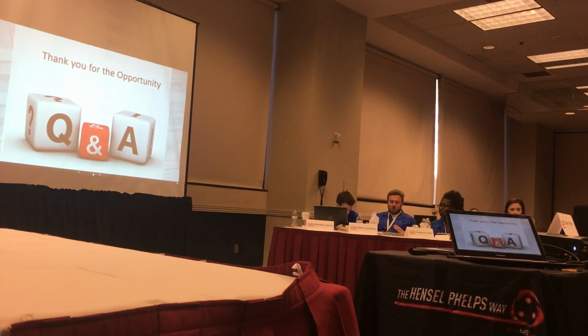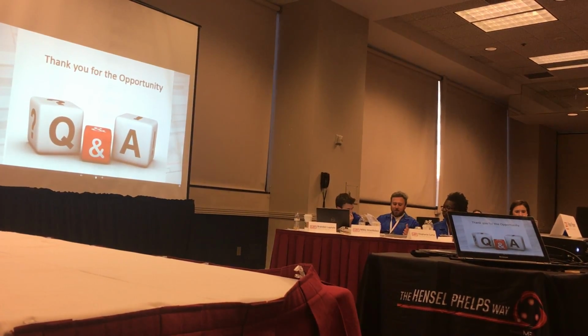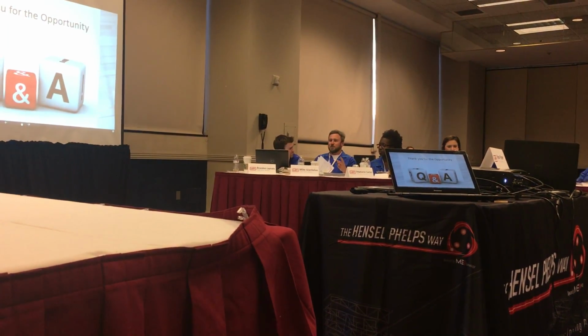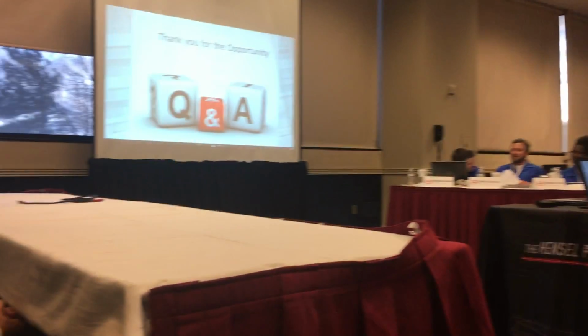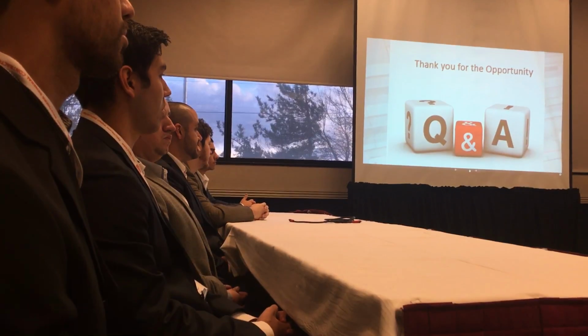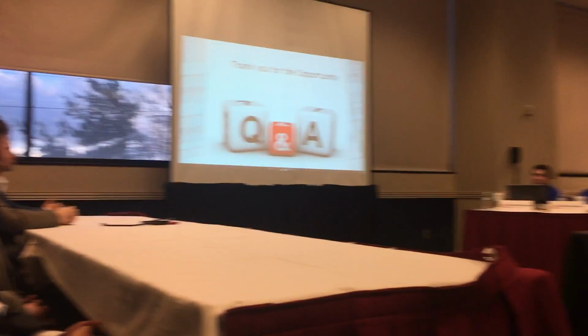As far as the GC estimate was concerned, the one question I have is related to one of the two things that you need to build a construction project, because there's really only two things. You need dumpsters and bathrooms. You're not carrying any cost for bathrooms, so what's your bathroom plan? Laborers, we're gonna have porta potties set up on the northwest corner of the project inside our perimeter fence. And what are you gonna do to pay for that, because you're not carrying the cost right now?